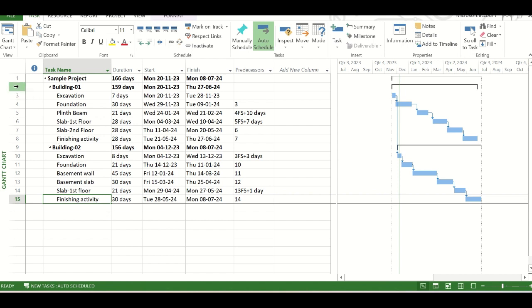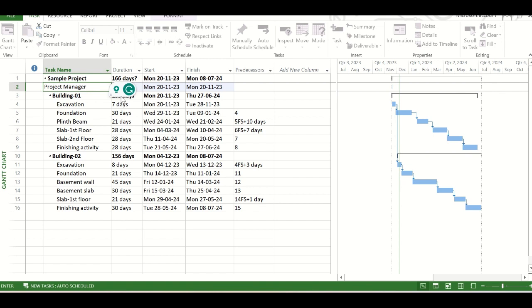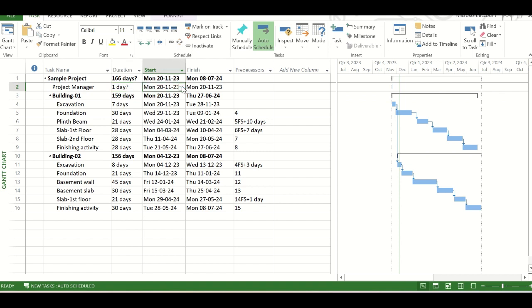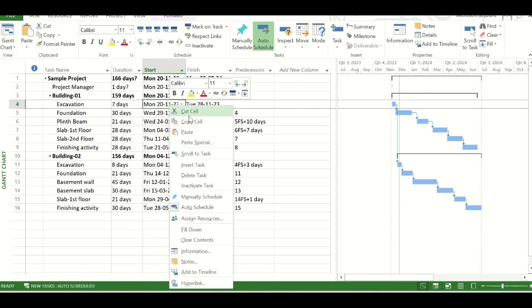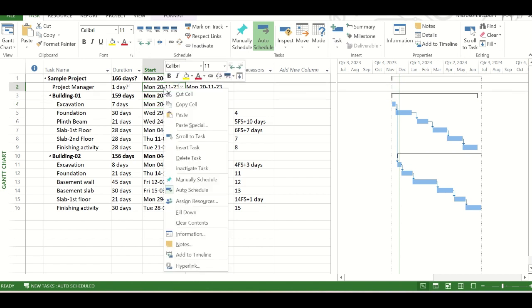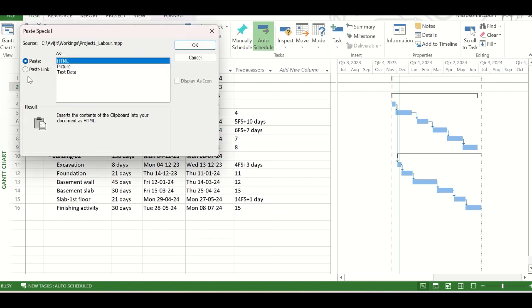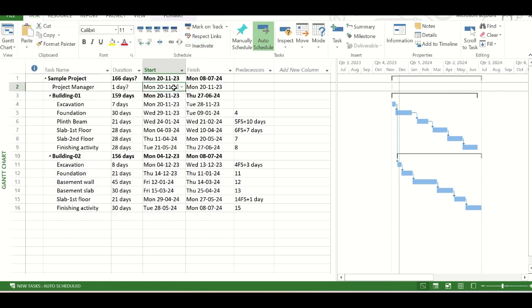How to include? Simply we will insert one task here, we will give the name as project manager. Now we will not give any duration to this task. We will go to the start date of the task on which the start date of this hammock task will be dependent. We will simply go and copy that cell by right-clicking it, then come back to the hammock task start date and then go to paste special from the right-click options. And here you see, in the paste special dialog box, there are 2 options. One is paste and another is paste link. So we will go for the paste link in this case and we will click on the OK. So now we have connected the start date of the hammock task with the start date of the project.